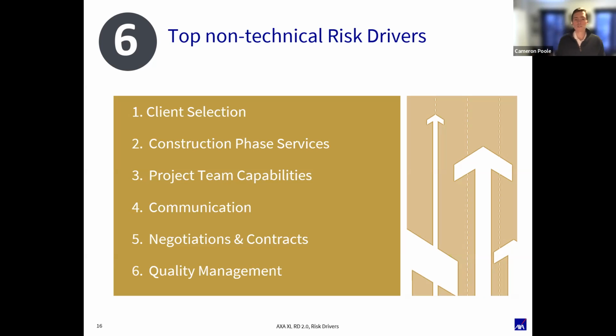In terms of the construction phase, you are only out there to check for general conformance with your design documents. Oftentimes the clients do not understand that, or do not want to understand that. Whatever it is, they think you're detail checking, standing over the shoulder of the contractor, making sure everything is perfect. So construction phase services, making sure that's right in the contract, and then performing those services correctly too. We'll talk about each of these a little bit more in depth.